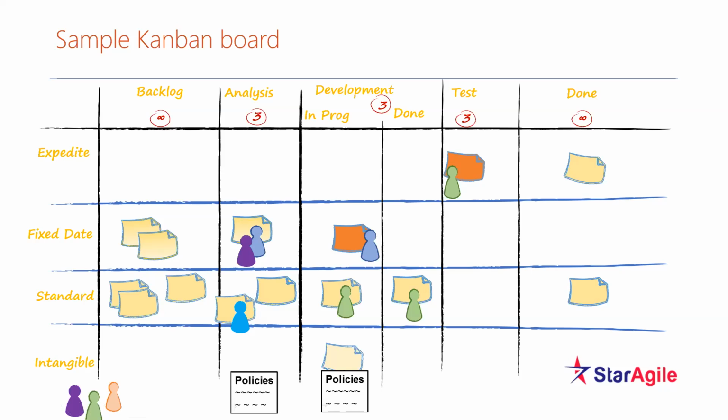And when you're doing your daily stand-up, or the daily Kanban meeting in front of the board, your focus is on going from the extreme right towards the left. So you first talk about what's in the extreme right column, when it's going to complete, and so on. You're basically focusing on how we can move the items from left to right faster, and on the extreme right moving into the done state. Okay, let's move forward.